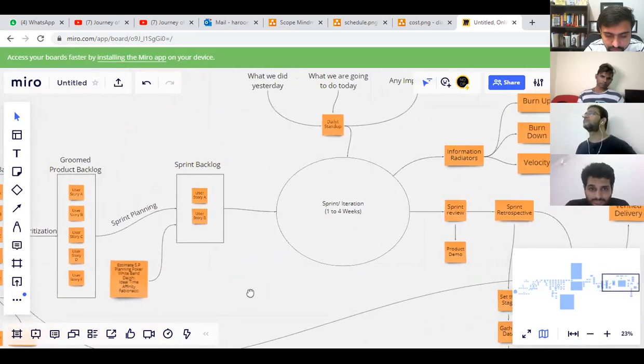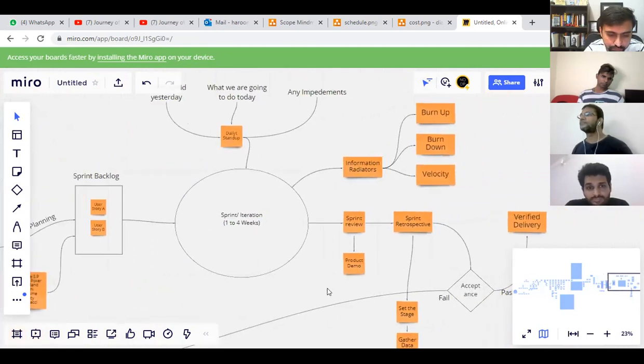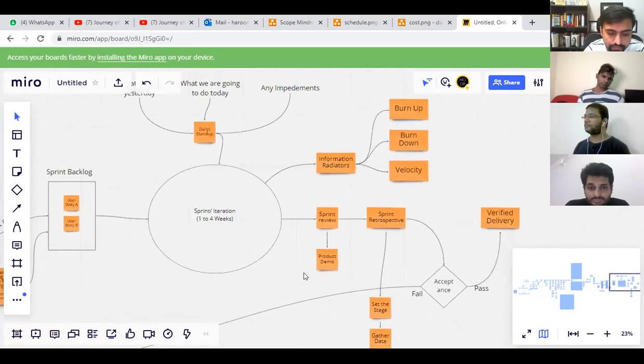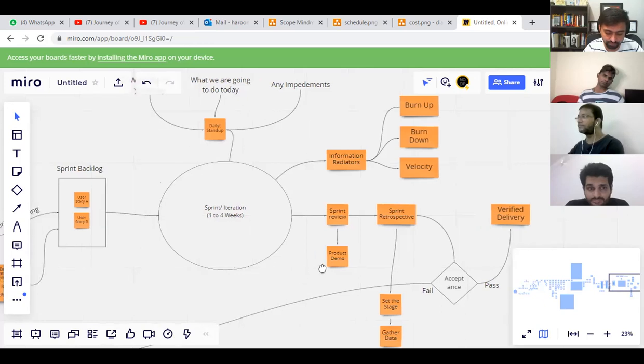And we follow some process where, in sprint review, we prioritize the user stories, and the development team does that. And once that is fixed, we go with story points using the Fibonacci series, T-shirt sizing, Delphi techniques, and planning poker.